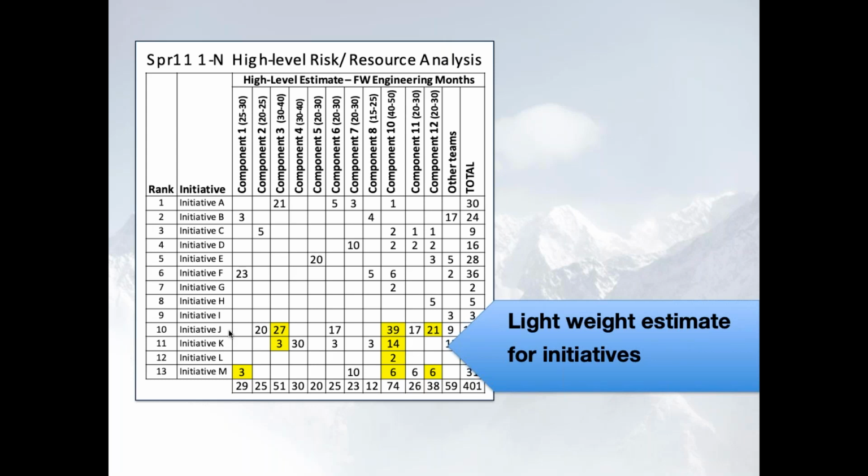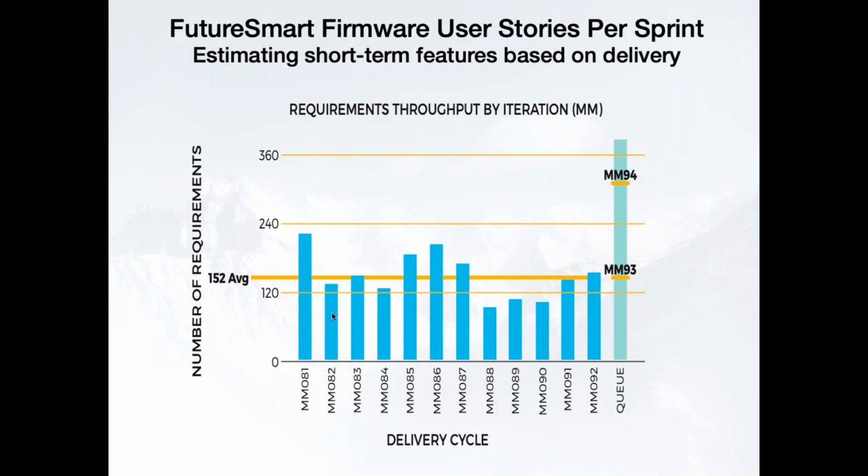what the marketing team wanted. The system engineer would go through the design. He'd say, here was my estimate for why I thought it would take this much. The team would discuss, well, what if we designed it this way differently, or what if we did it that way? They'd come up with a different plan, and then they would create a work breakdown schedule, which was really their understanding of what the work would take. And that work breakdown schedule was this type of view of the requirements. So the first was just a high level, call it an epic. And this is where you got down more into the story types of things that were put in place by the people who were going to do the work.